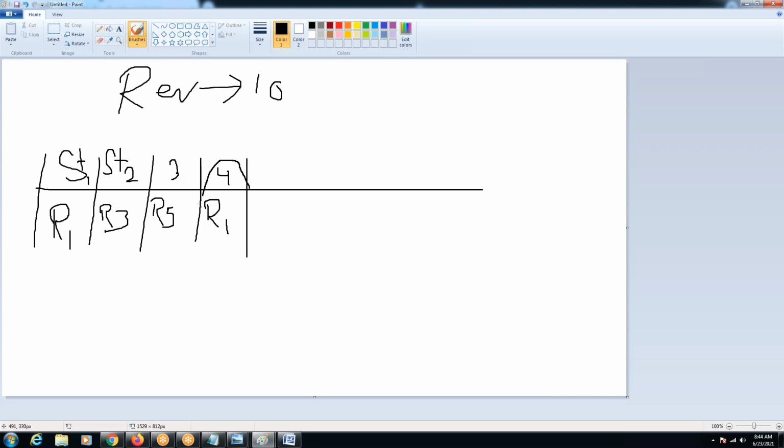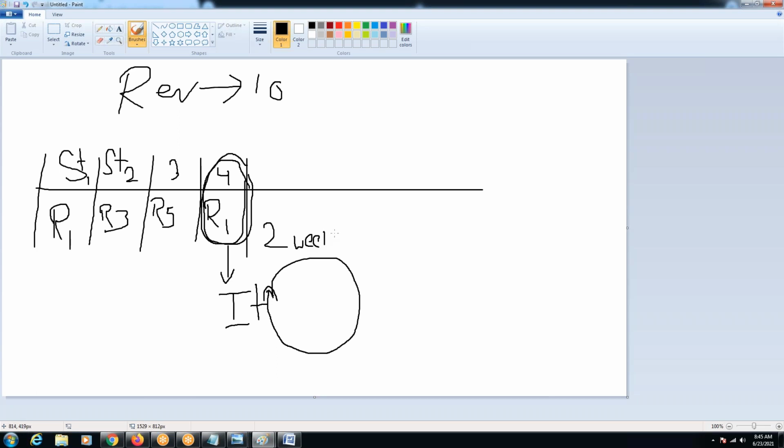Each set of segregated requirements goes through a cycle, which we defined in yesterday's language, a story getting into an iteration process. In an iteration, you do planning, risk analysis, designing, coding, and testing. This is what happens in the agile process also. Every story needs to be accomplished in 2 weeks. That is the maximum duration they give.